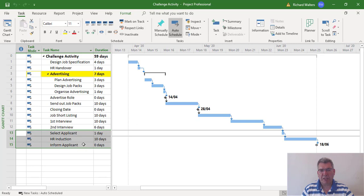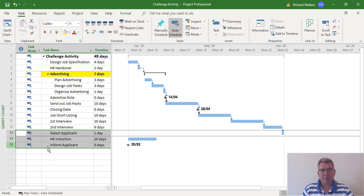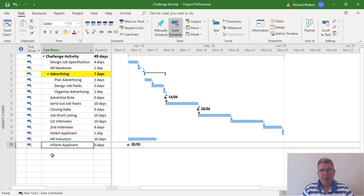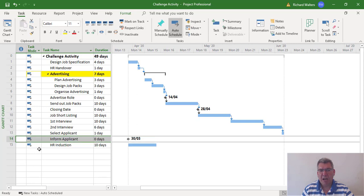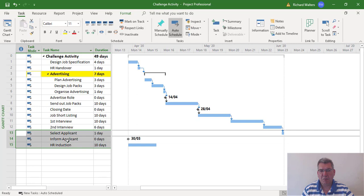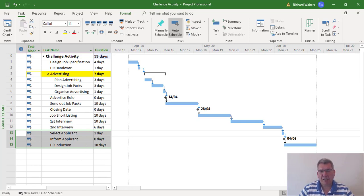I'm going to select all three tasks because I want them all broken away from the second interview task so I can move them around. When I teach my face-to-face and online courses I call this isolating. The process I think of is: first isolate, then make the change - in this case moving the task to a new position - and then reconnect. Those are the three words: isolate, change, reconnect.